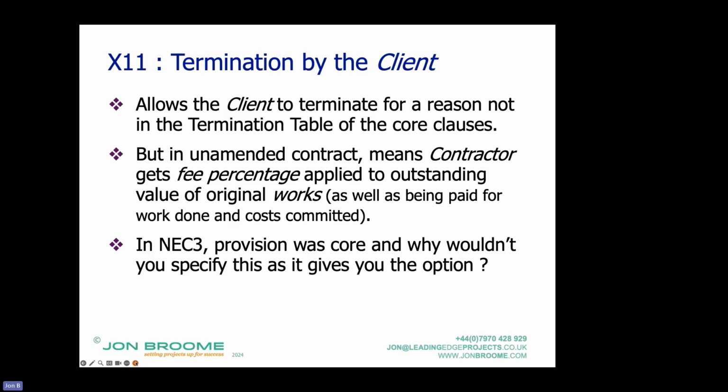For some reason in NEC4, they changed this so that it became an option. It was taken out of the core clauses and put into X11 as an option. It's sometimes called termination for any reason. Strictly speaking, it's termination for reason not listed in section 9.